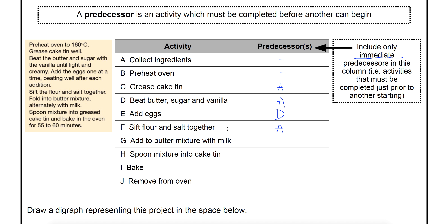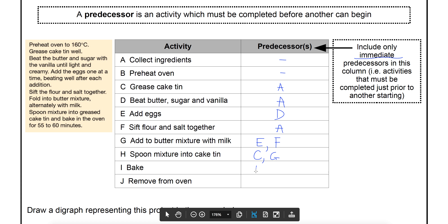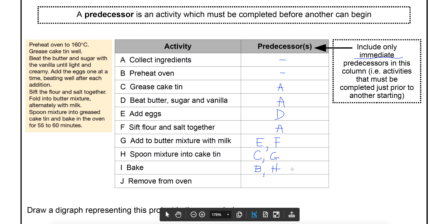For G, we're adding those two mixtures together, so we need the first mixture with the eggs done (E) and the sifting of the flour and salt done (F). So E and F are immediate predecessors of G. Once that's done, we're spooning the mixture into the cake tin (H), so you need G done, but you also need the cake tin to be greased, so C has to be done as well — C and G are predecessors of H. Baking (I) requires the oven to have been preheated, so B is a predecessor, and the mixture needs to be in the tin, so H is also a predecessor.